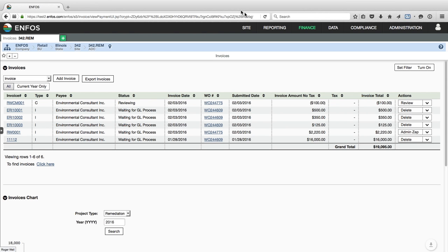That would require a two-step process. You would need to do a re-estimate on your T&M, and then you would need to do a change order to that work order for your new units. So it'd be a two-step process to complete that action. It can just get too complicated when you allow too many moving parts on any one given transaction.